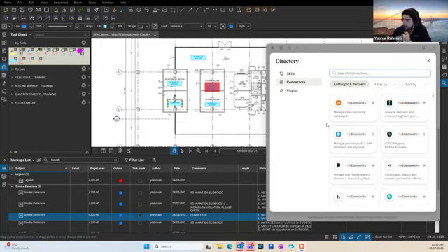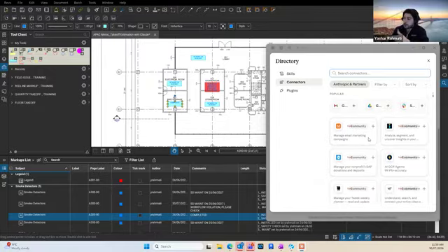In a workflow that I was looking at, one of our clients had all the estimation templates with rates and prices and materials and costs saved in a template. They have them all stored in, for example, SharePoint, and they had their Claude connected to the SharePoint. So once they were doing a lot of takeoff, all they need to do is jump into Claude, write the prompt, go to my SharePoint, grab my template, take all the takeoffs from Bluebeam, put them in my template, calculate based on the rates stored in my template, and give me an estimation report. That's a very fast way of creating an estimation.